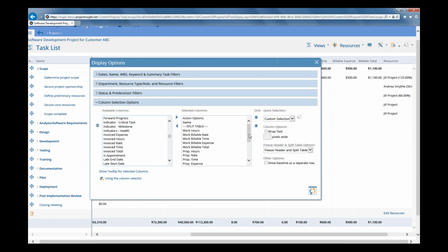And so we could put these invoiced amounts on here as well, and I'm going to, again, stick them just before resources. And it's following that same scenario, is that you have the hours times the rate, and that gives you the amount of your labor. Then you add in your expenses, and the labor plus the expenses gives you the invoice total.